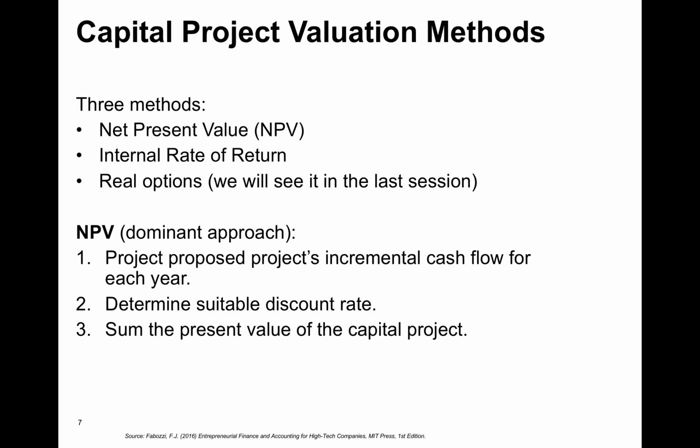In those situations, we need to be able to work with a given scenario, and we cannot be exposed to potential or probability of changes in the future. So most of the time, if you want to understand an organization or value an organization and look at their projects, we will end up looking at the NPV. And as you already know, the key issue here is that we agree on a discount rate for the whole period of time of the project, and also that we are able to understand how those future cash flows evolve in time.